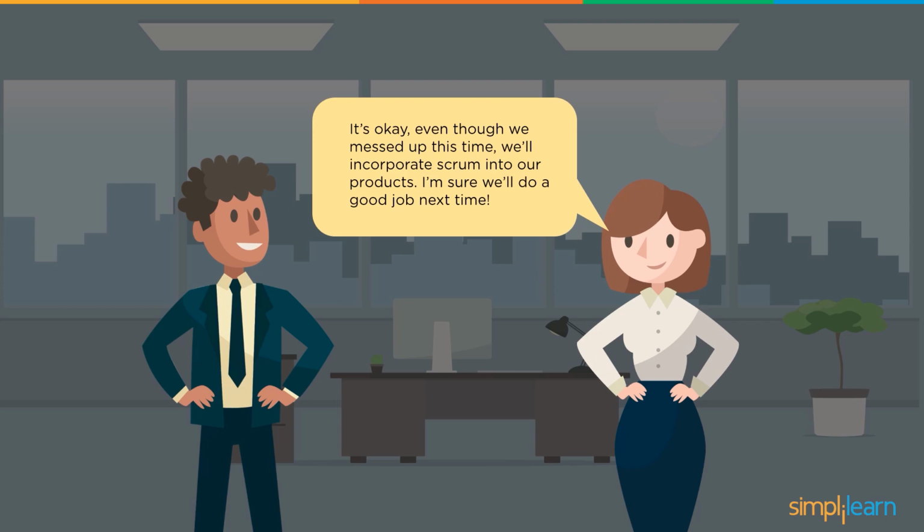It is always advisable to go for a Scrum approach whenever there is a dynamic of quickly moving from left to right, from product backlog to the increment that needs to be created. So accomplishing that speed and involving the consumers regularly, if it is feasible. If consumers and stakeholders say they cannot be involved, then you becoming agile will not make sense, because they are not even giving the feedback.